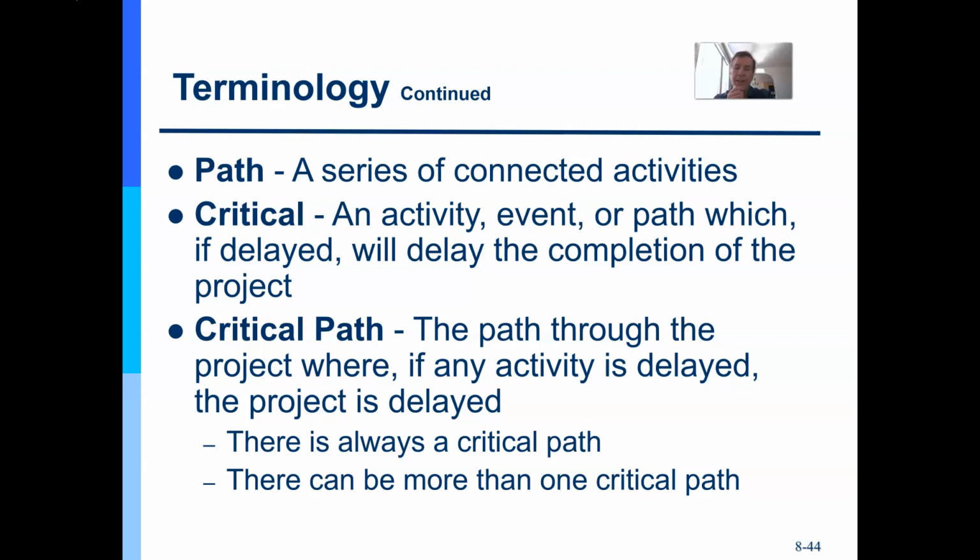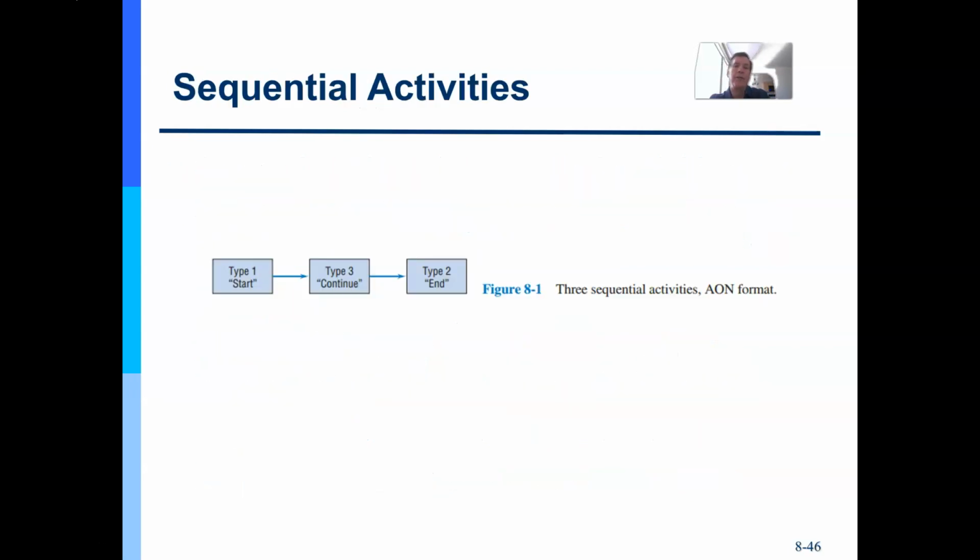And we said that a critical activity is not one that is more important than the others. That doesn't make it critical. It's an activity on the path that if that activity delays, because we're talking about the schedule, that delay will delay the entire project, right? And you piece those key activities, those critical activities together, and you end up with a critical path.